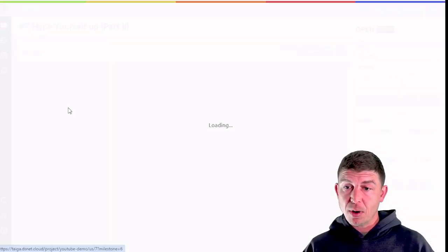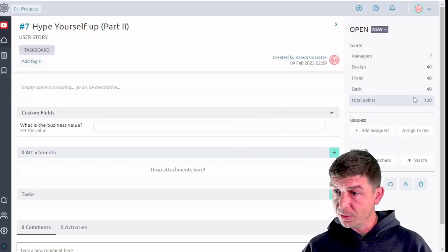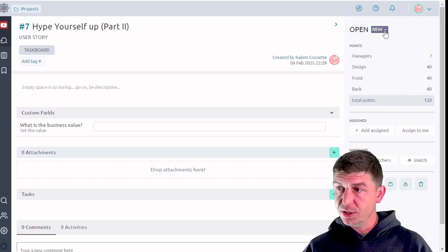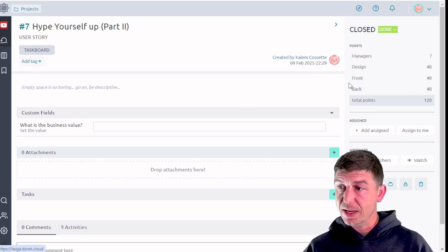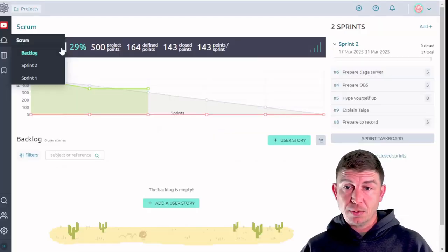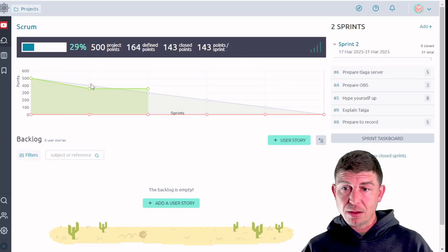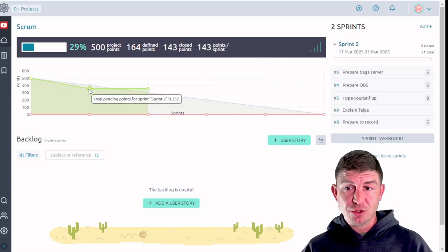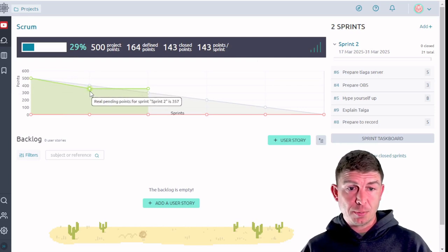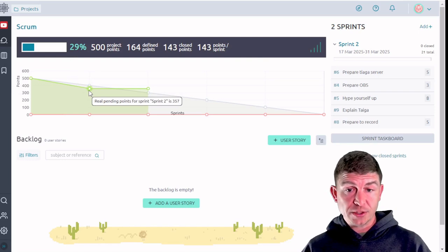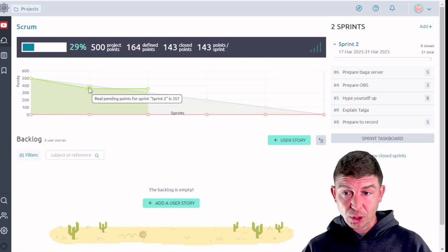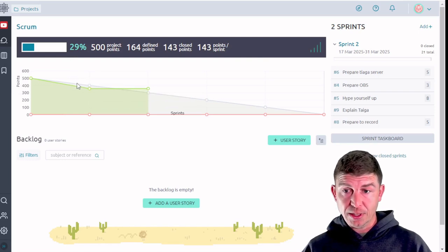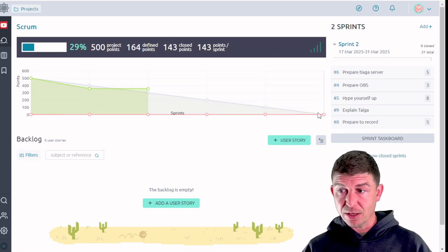Then I'm going to go back to my task board. And I'm going to mark hype yourself up, which is worth 120 total points. I'm going to mark that as done as well. And when I go back to my backlog, you'll see that here I'm actually ahead of schedule. The total number of hours completed or points accomplished has dropped below the expected rate of burn.